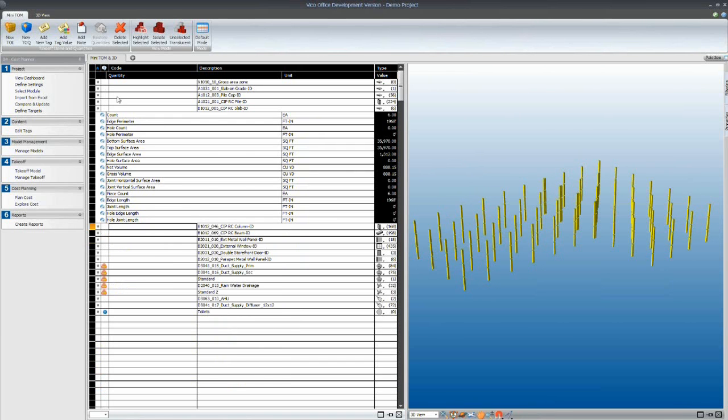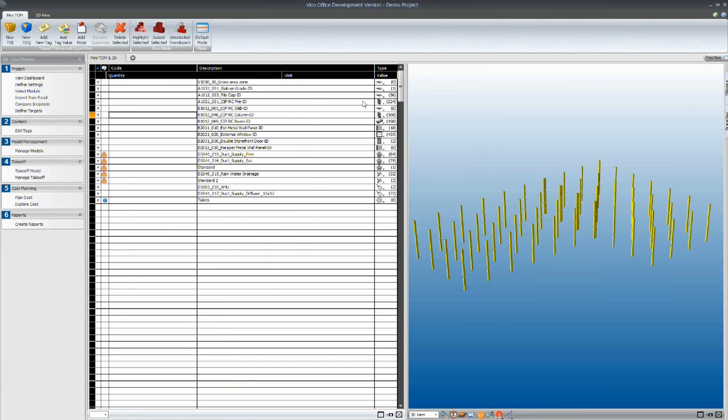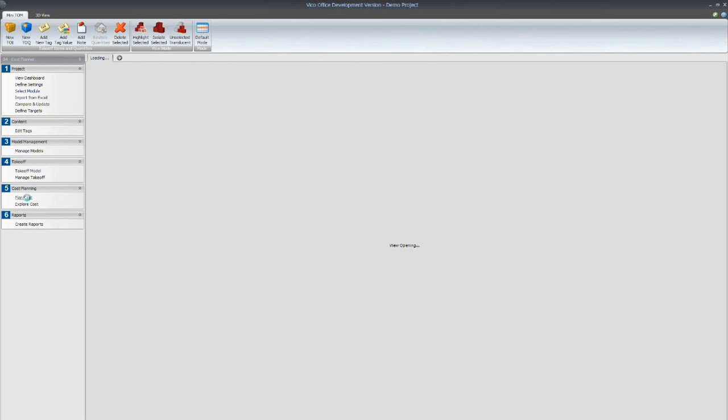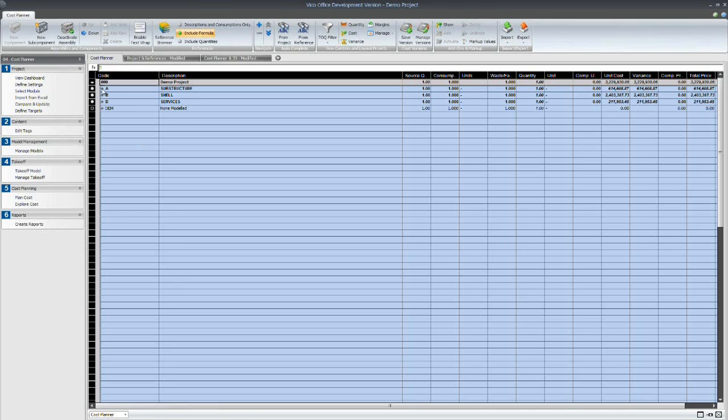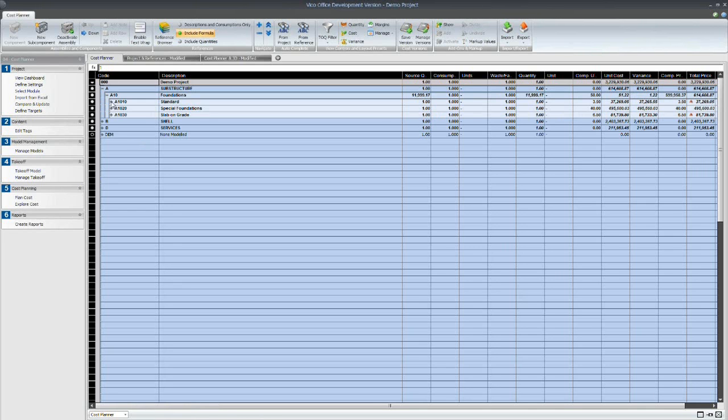So that's the normal process. You would run through and make sure you're happy with all these items, and then reassign as needed or add new items, and then we'll be ready to actually start planning the cost with that data. So these are all predefined. You can take your standard database and you can ask a pile cap to always look for this takeoff item, and if you set your models up accordingly, this will automatically link. Or we can do it manually.